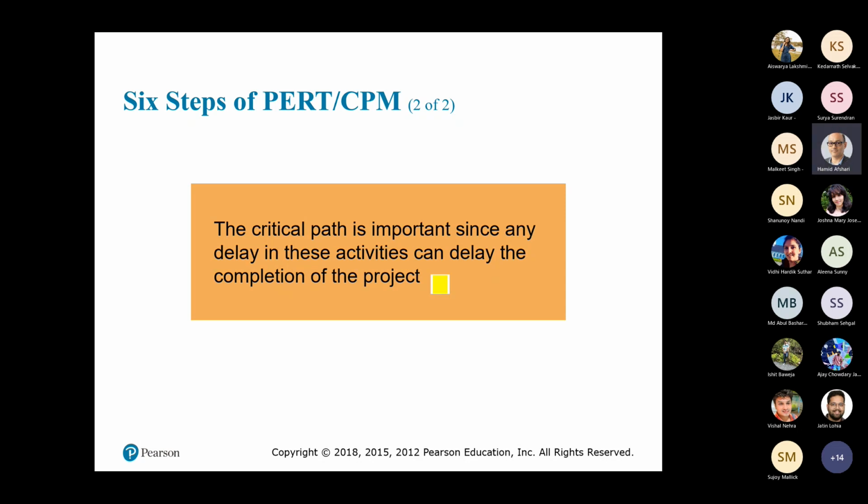If that person is 5 minutes late, what will happen? The time would be the same, I guess, because the half hour guy would take 35 minutes, but the 1 hour guy takes 1 hour, so it would be the same time. Yeah, so it will not impact the total length of the project. So they can still go at 7 p.m. Good. So that's the idea.